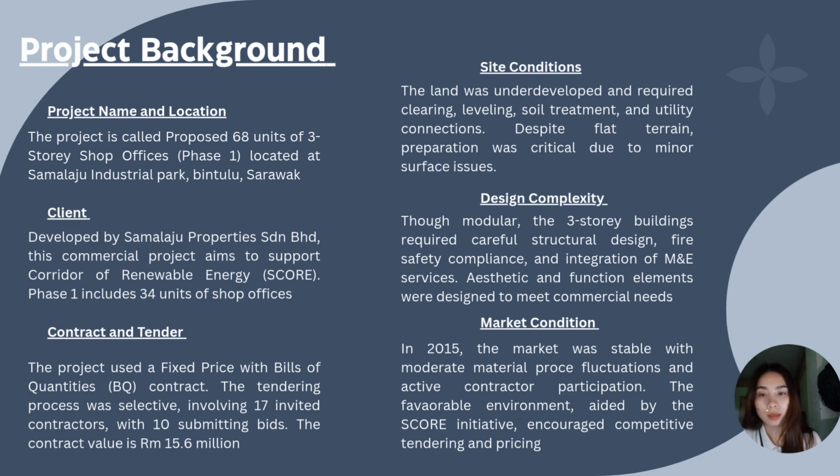Moving on to the contract and tender, the project uses a fixed price bill of quantities contract and applies selective tendering. In this project, 17 contractors were invited, but only 10 submitted a bid. The awarded contract value was 50.6 million Malaysian ringgit.